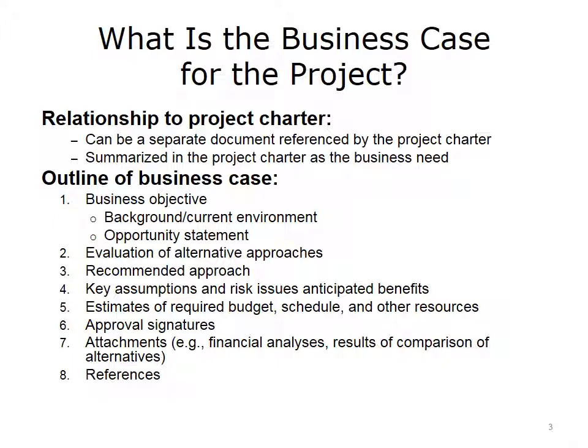The project charter is a record of why the project was undertaken in the first place. The business case for the project can be part of the project charter. The business case presents the business objective for this project. It answers questions such as, what is it, in business terms, that motivates you to undertake the project? What are alternative approaches? What is the recommended approach? What are some of the assumptions and risk issues? What is the project going to do in terms of benefits compared to the cost of the project itself?